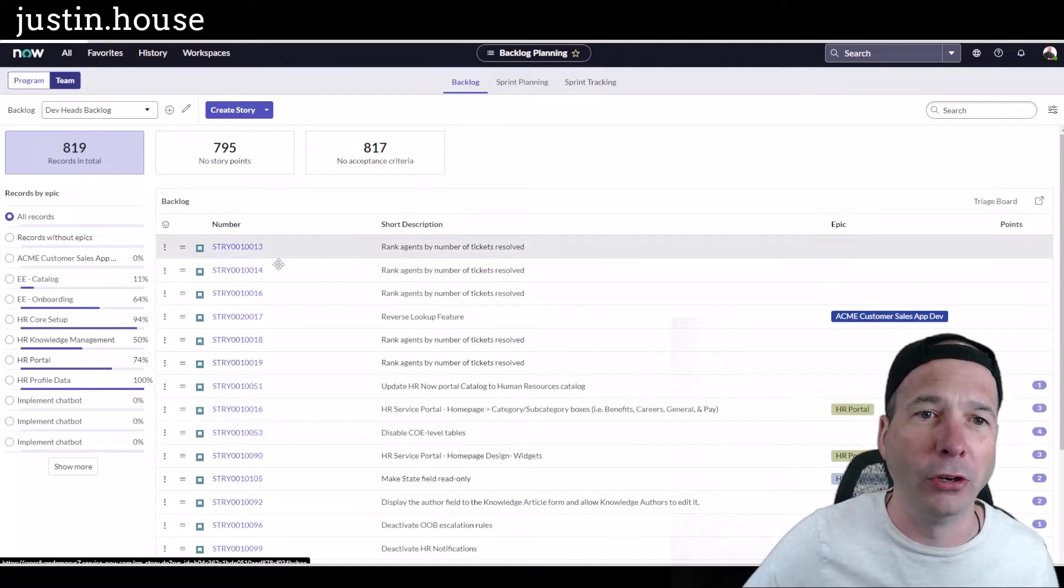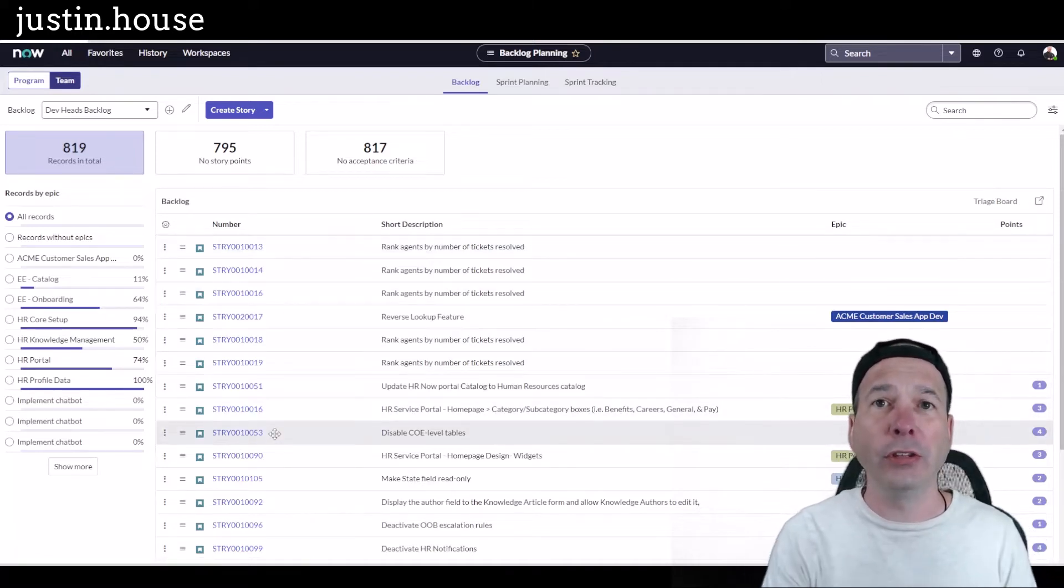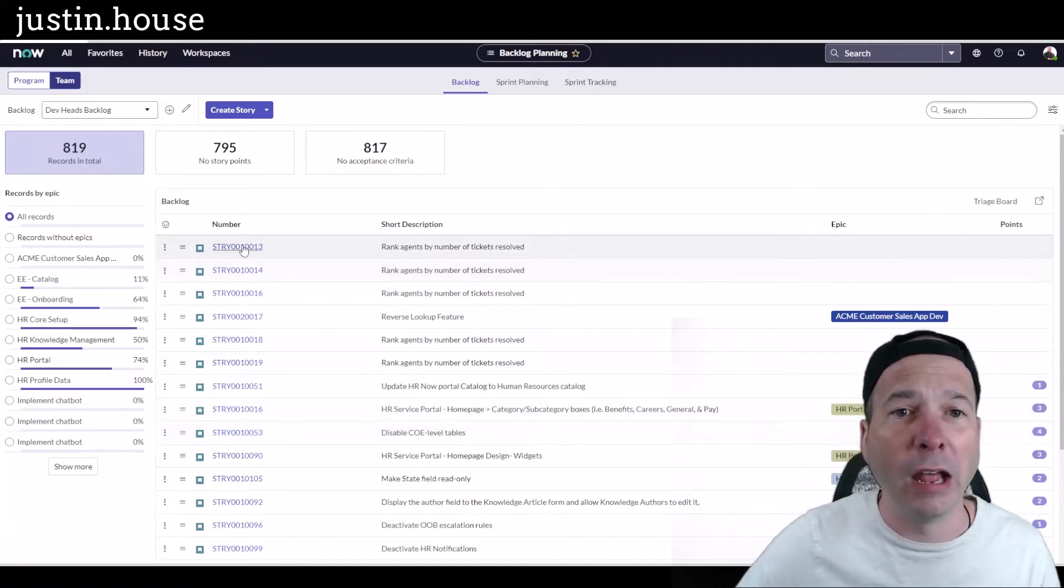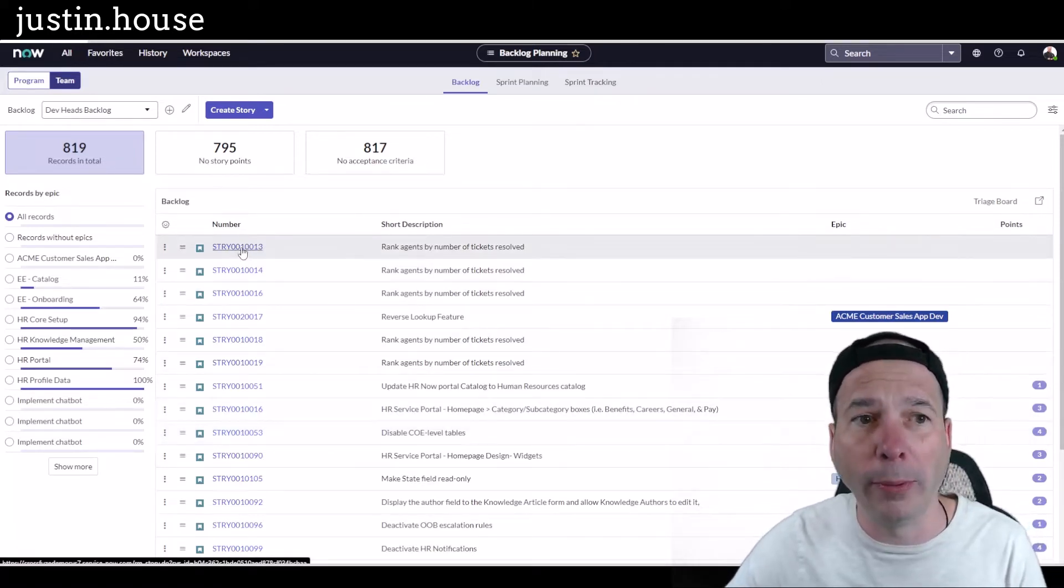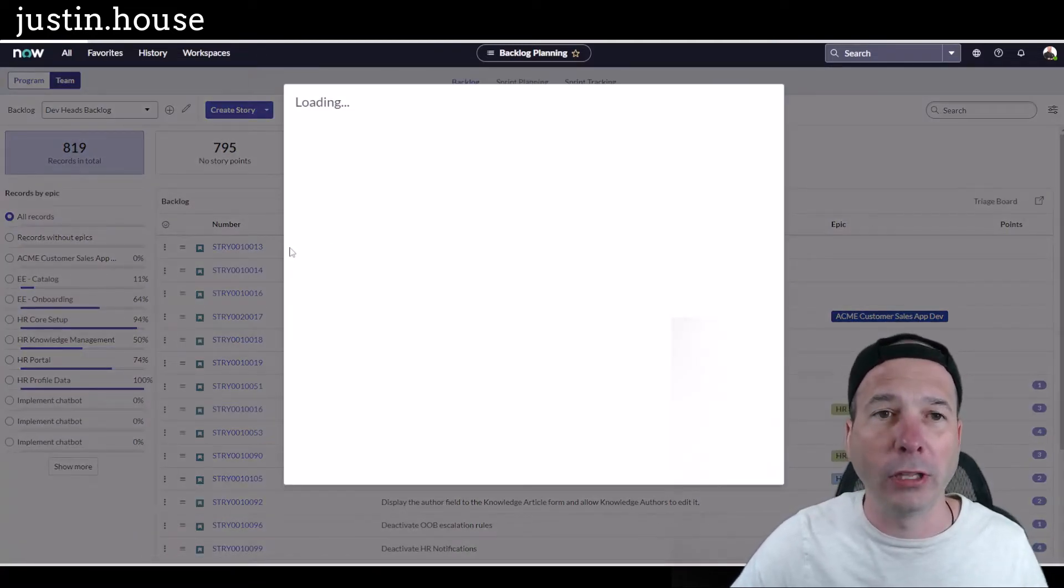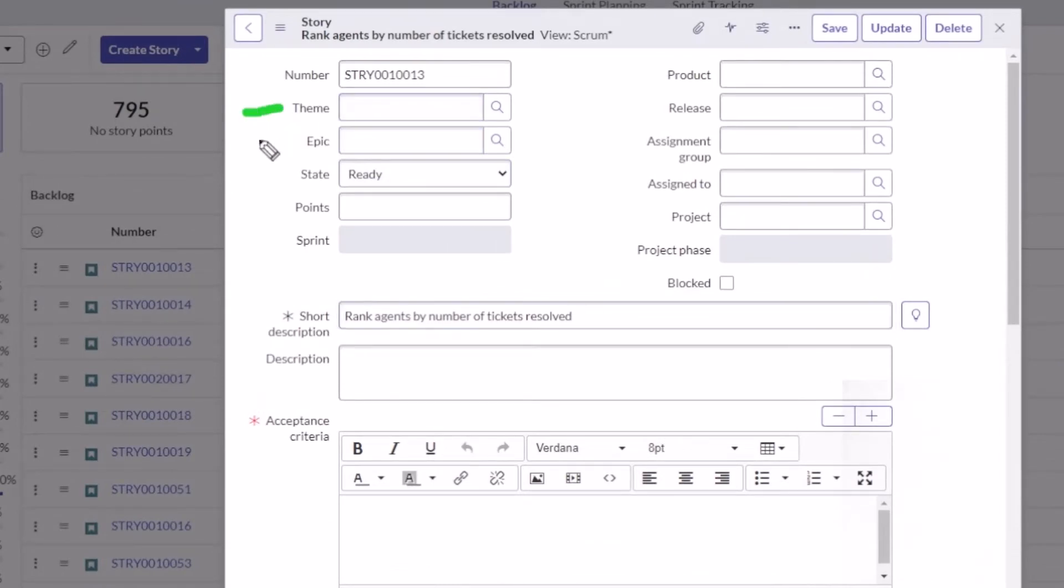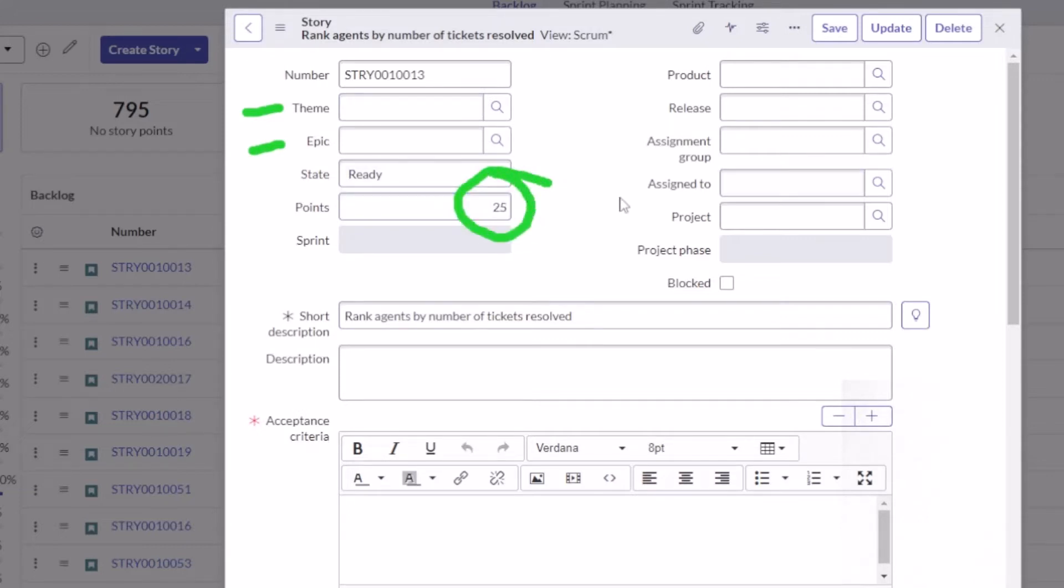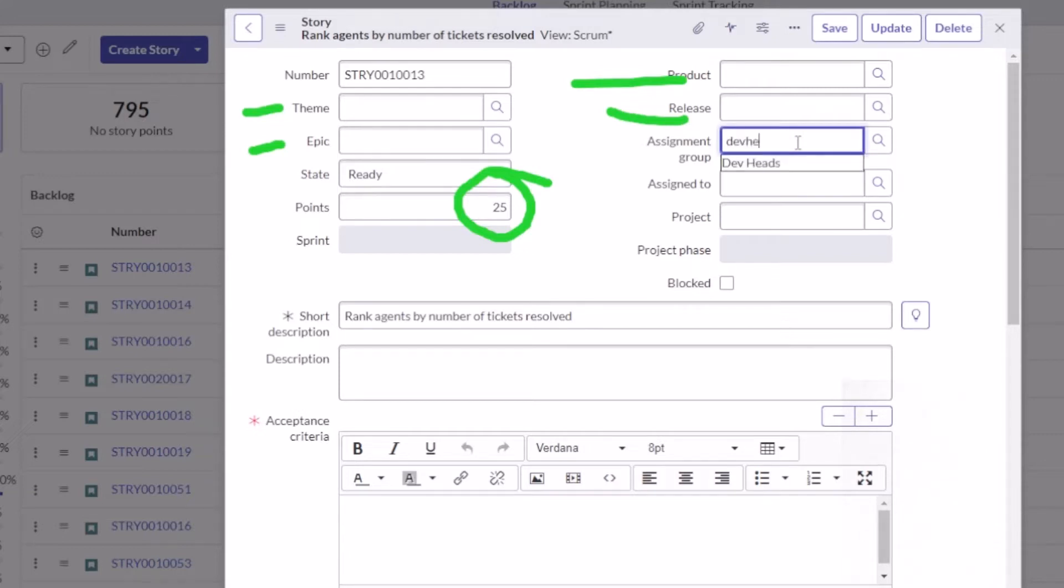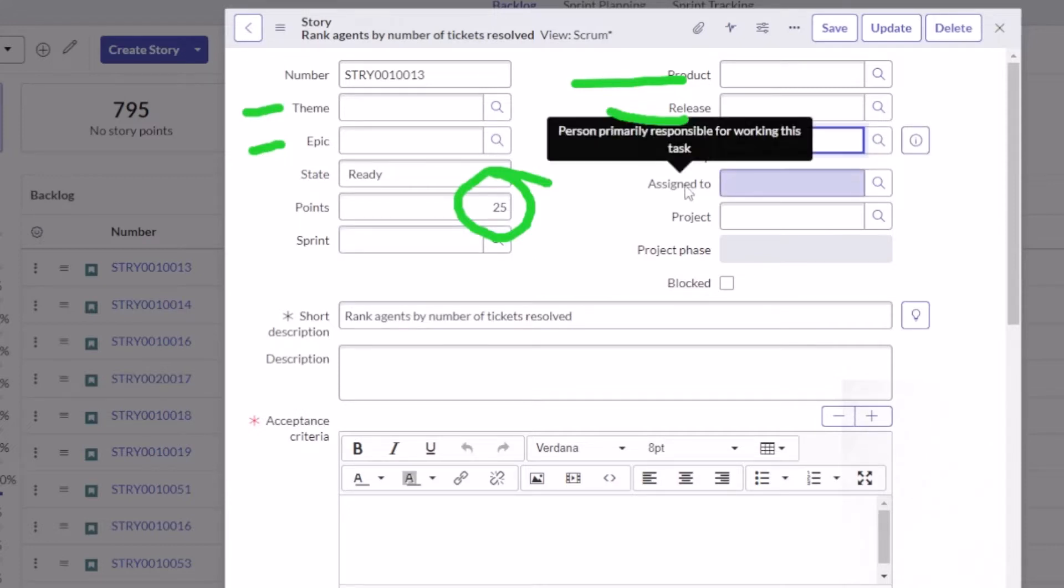You can see them all. This is what a backlog looks like. If you're grooming a backlog, you come in here and look at all the different fields you can fill out. Depending on how yours is configured, you might do a theme, assign an epic, assign some points. This one needs some points, so let's put 25 points in there. You might want to associate with a product, a release, or an assignment group. I want to give this to my Dev Heads team.